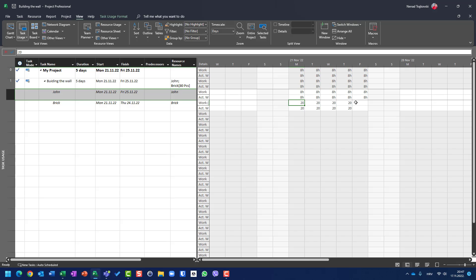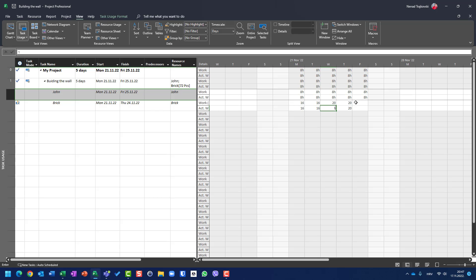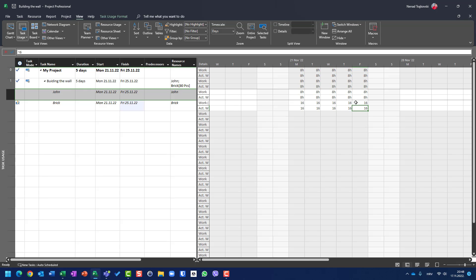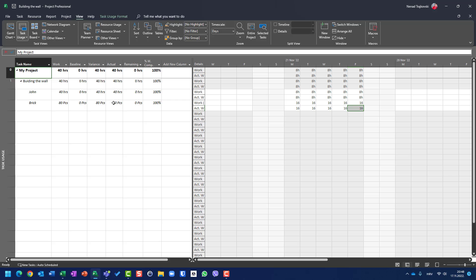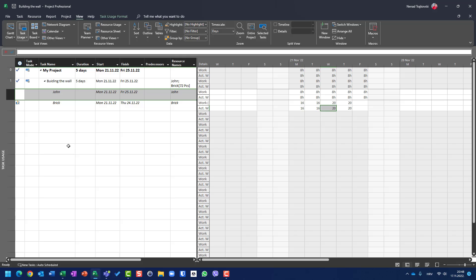So if you want to record 80 bricks spread evenly, the only thing you can do is enter the values manually: 16 on Monday, 16 on Tuesday, 16 on Wednesday, 16 on Thursday, 16 on Friday, giving you 80 total. If you check the work table you will get 80 pieces. But if you want it done automatically, you will get what I showed you: 20 pieces per day for four days.